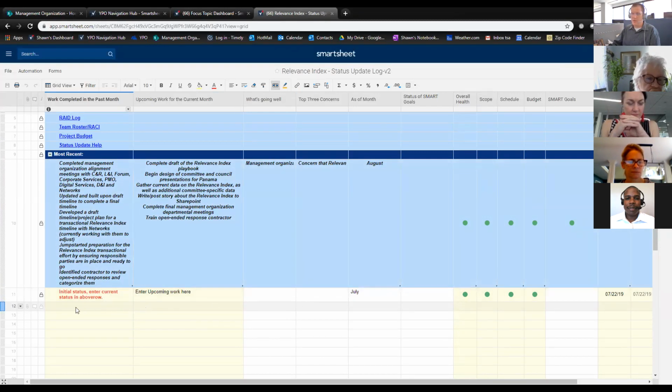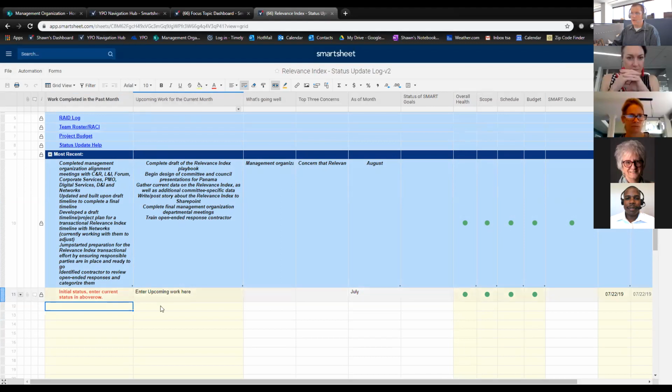So if I was to come in here and start typing on this row here, answering work completed in the past month, I'd type that in. Upcoming work for the current month, I'd type that in here. What's going well, I would type it in here and just answer those questions across here. The most recent list or row will be your new status. So if I enter this new one in, it would go in as the new status.